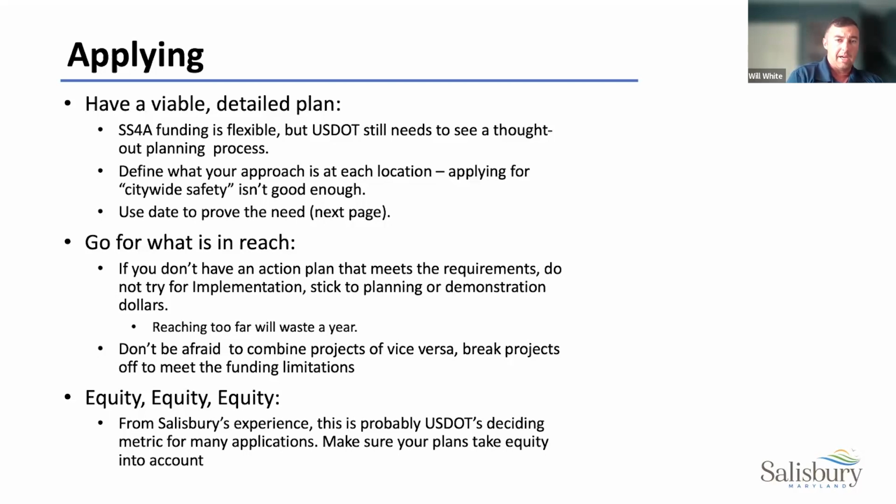Don't be afraid to combine projects, or vice versa, break projects off to meet your funding limitations and what you can come up with matches for. So like I said, our project is actually about 120 projects put together across the entire city. Small ones that would not of themselves have met the minimum funding requirement, but together they add up into something that does.